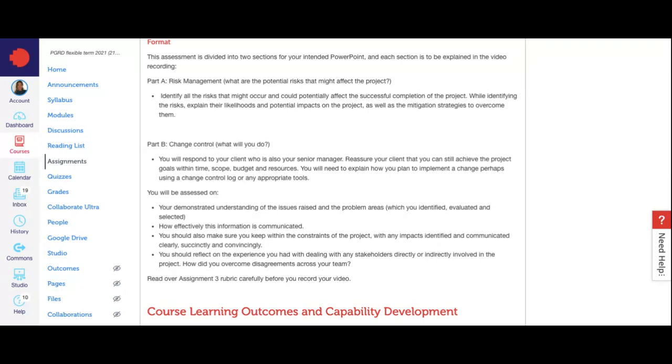And also the change log will be inspired by the urgent news initially, but also by the mitigation measures. When you're providing for each risk a potential solution on how to deal with it, that guides the changes that need to be made as well. So you can be inspired by that to have it in your change log. Okay, thank you. Not a problem.